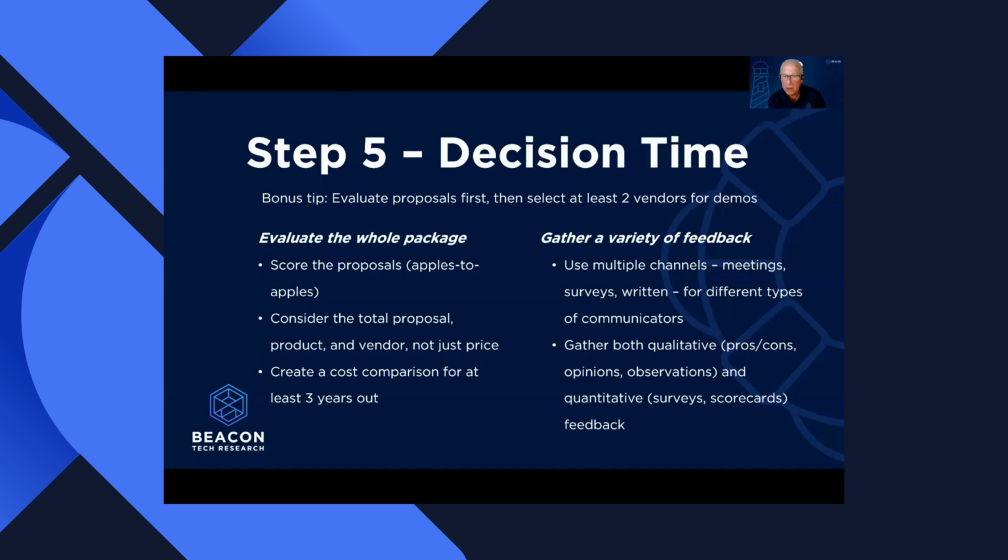So consider the total proposal, the product, the vendor, not just the price, and create a cost comparison, and do that 3 years out. All the vendors are going to give you their implementation costs. And remember, in that first year, every vendor is going to charge you both the implementation and the first year's run rate cost.